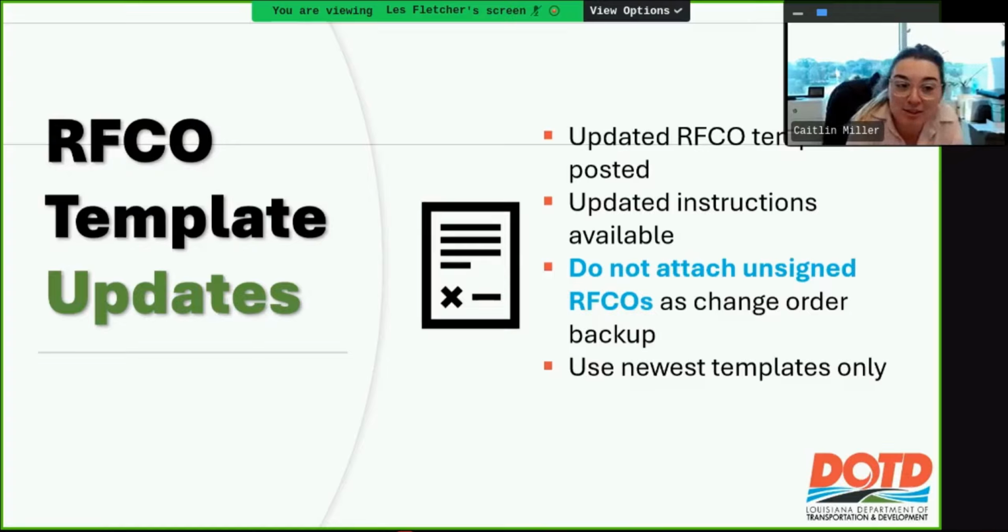There was a situation in which pricing and backup pricing documentation was included in an RFCO. So everyone at headquarters, the chief and everybody assumed that the contractor was in agreement with this. After it was fully approved, the contractor called up here asking what was going on because they had never submitted that stuff. So to prevent that from happening, we're no longer allowing PEs to fill it out anymore. You might be thinking to yourselves that one person or group ruined it for the rest of the state, and the answer is yes. We assumed everyone would know not to submit pricing without talking to the contractor, but you know what they say about assumptions.